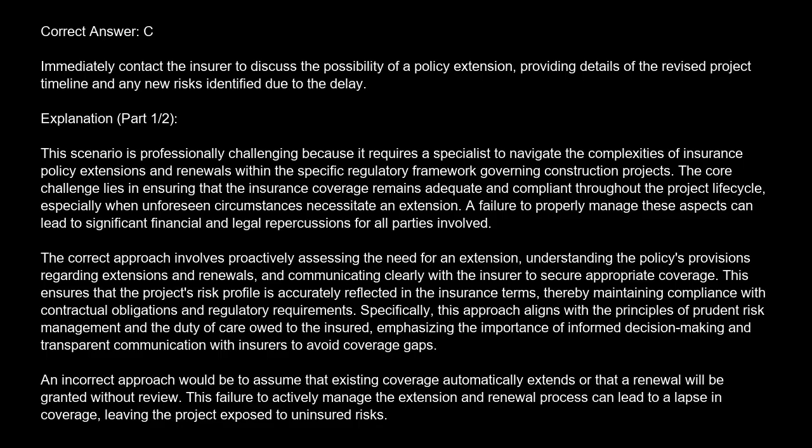The correct answer is C. Immediately contact the insurer to discuss the possibility of a policy extension, providing details of the revised project timeline and any new risks identified due to the delay.